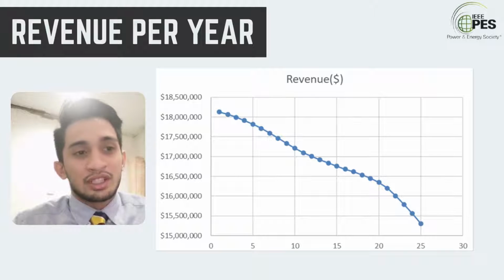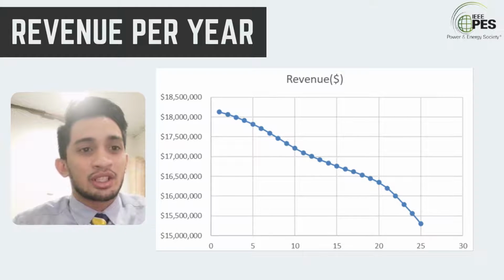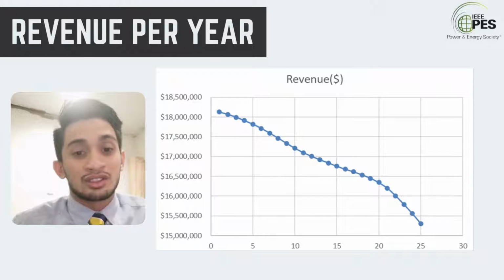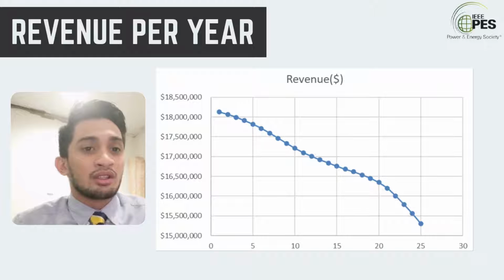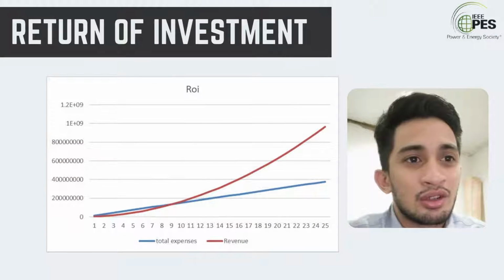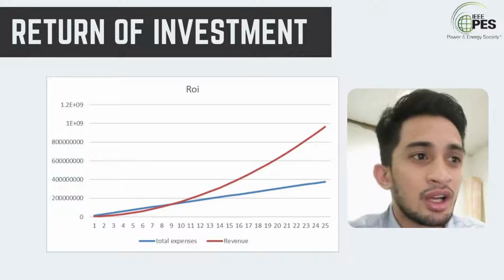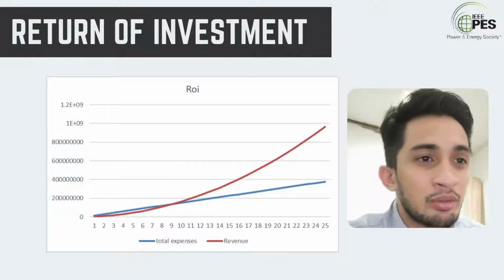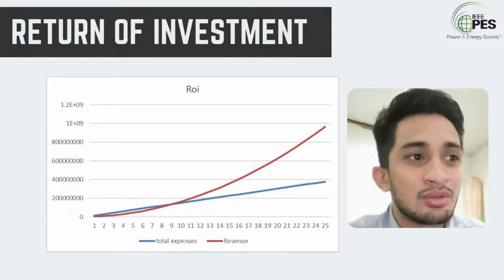With a small percentage of profit margin, the project itself can generate a good revenue for our investor. The estimated growth of revenue is around 7% per year. This indicates our strong financial model and financial capability in delivering this project. The return on investment for this project is estimated around a 10 years period. Since the 50 megawatt project uses a lot of funding, a 10 years payback period can be considered the best investment for the investor.